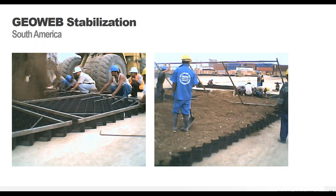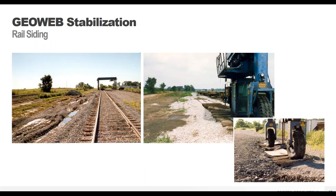Once again, typically we just stake the corners, but like you see, this guy wanted a really precise installation. After the fill is put into the panels, you just remove the spreader frame. I'll show you a couple different ones later in the presentation. But it's always good to make sure that those first couple panels are installed square. It's like hanging drywall. If you don't hang them square to start, you'll have issues as you keep going, as far as stretching it out. It doesn't matter how small the project is in size. We always provide the same amount of technical support in our evaluations, including cross-sections, calc specs, and a written summary.